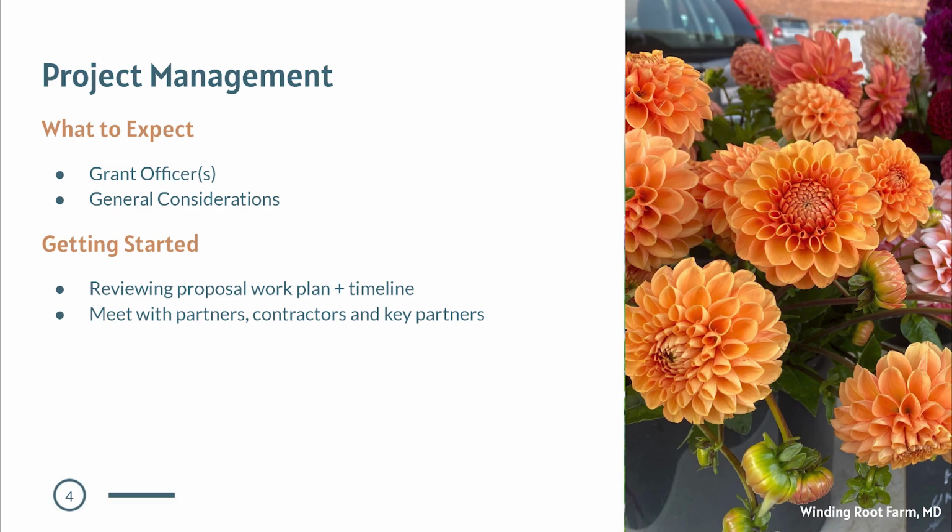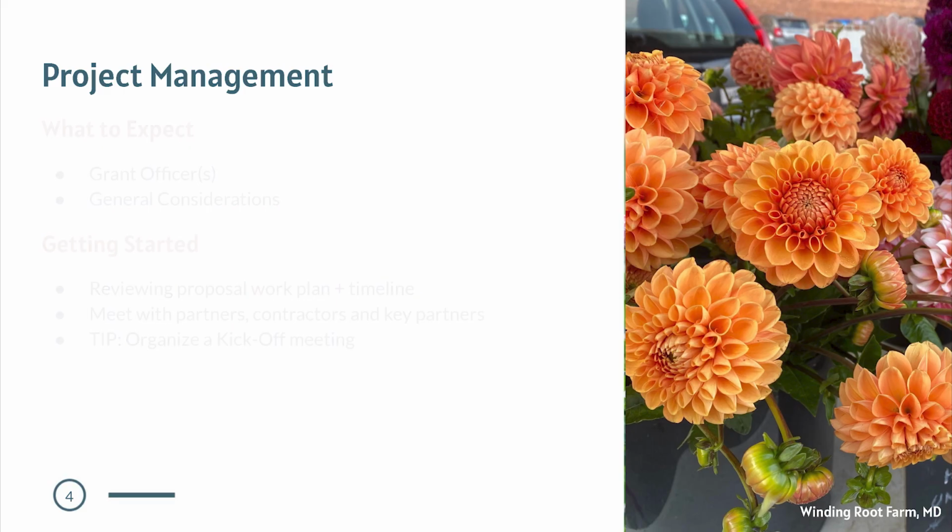Once you've updated your work plan and timeline, we recommend hosting a kickoff meeting with your project team, whether that's internal staff, partners, or contractors. This is a great time to confirm project deliverables, assign responsibilities, and make sure everyone is on the same page with the timeline. Over the course of your project, there may be times when you need to make changes to your activities, budgets, or subawards. It's important to remember to review your grant terms and conditions for the specific guidelines on how to request revisions and get USDA approval.